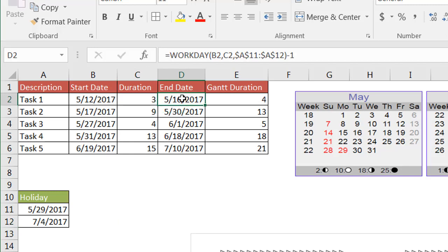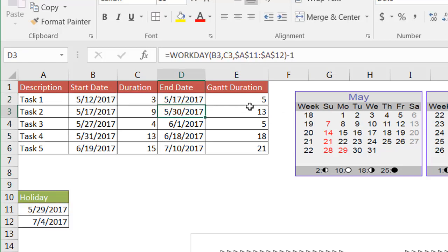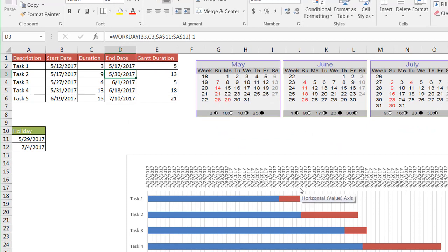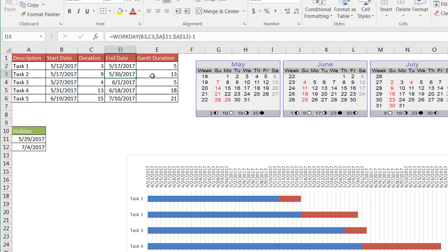You'll also notice that I have a minus one here, and I'll explain that. If I didn't have a minus one here, let's delete that. It's going to take that start date, 5/12, and add three days to it. So it's going to add the 12th, which is one day, the 15th, number two, and 16th, number three. And it's going to look at the end date as the 17th. Well, the end date is actually the end of the 16th, not the 17th. And that's why I have that minus one there.